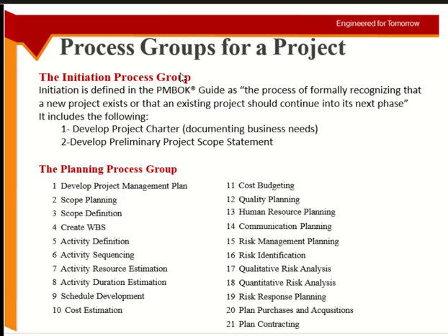Okay, very close. Budgeting also involves time management of the cost. So how much you need when? The contractor, the consultant, the client, all of them may not have the total budget ready at any time we want. So they have to do the time management with the budgeting as well.